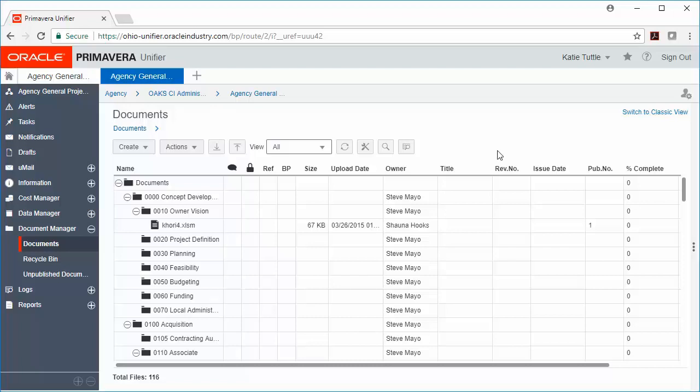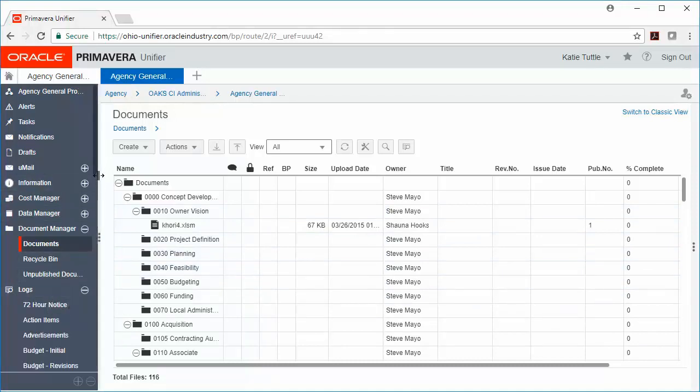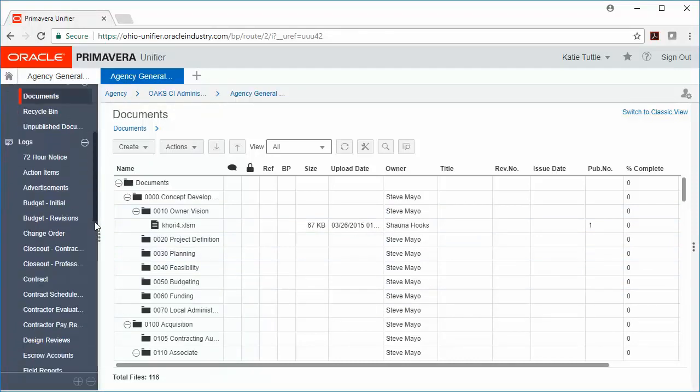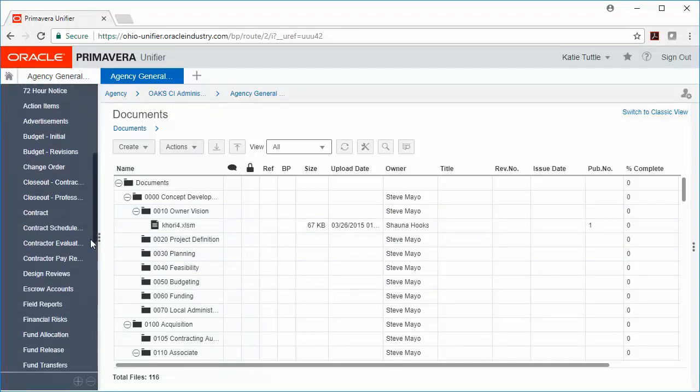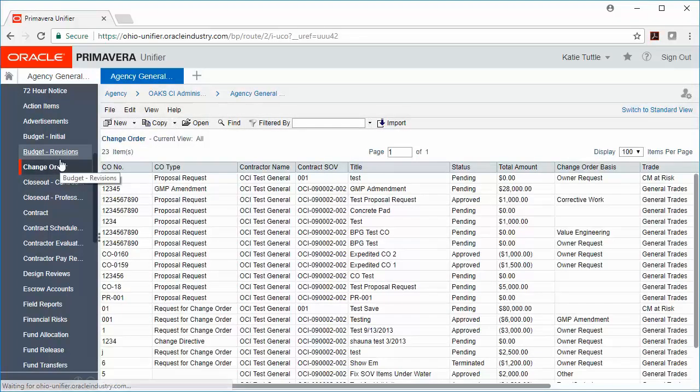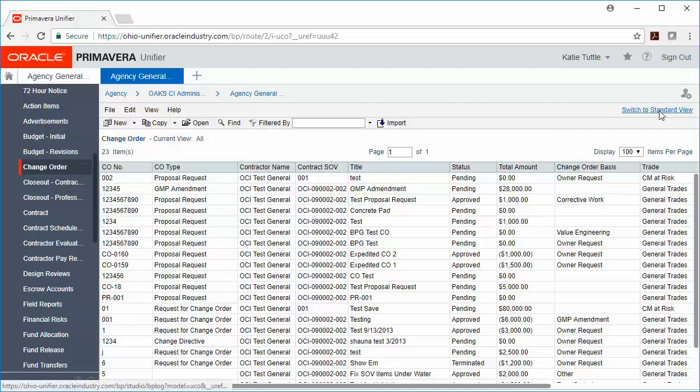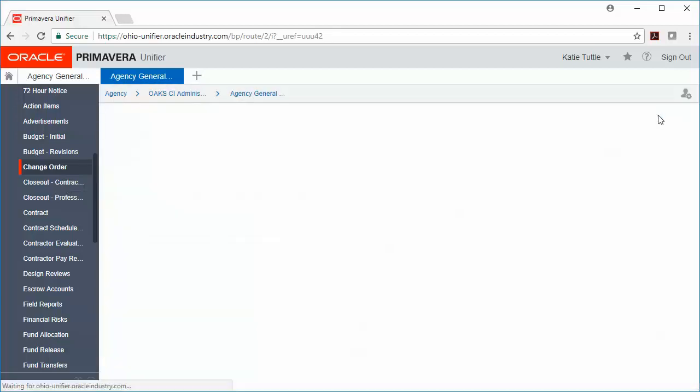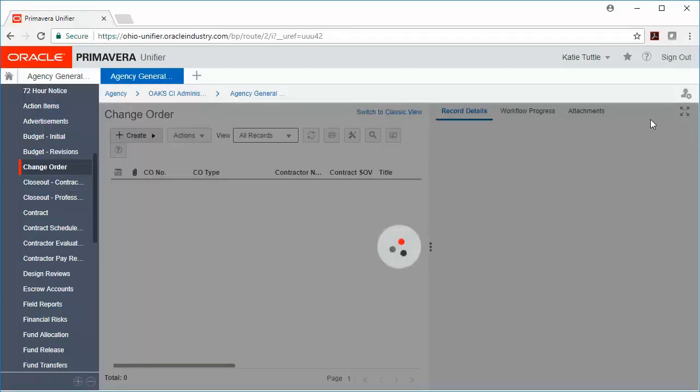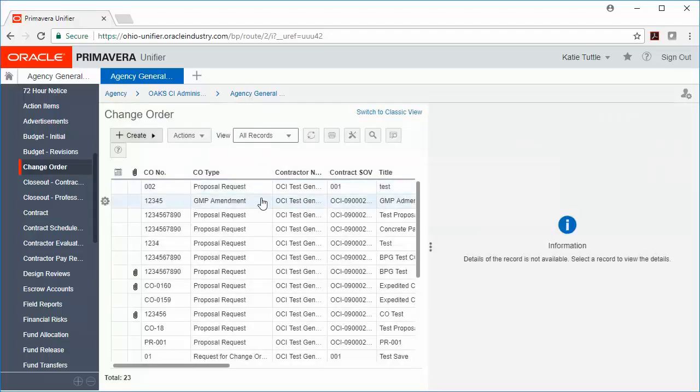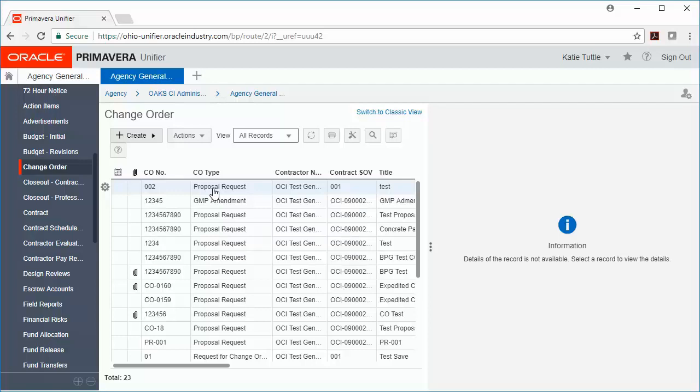Now let's move down to Logs, and then let's click on a record. For example, let's click on Change Order. In Logs, we're going to switch to Standard View on the right-hand side of your screen. And then we can see an entire list of the change orders. So when we talk about logs, logs houses actually all of the records for your project. So that's your contract, your professional services agreement, your change orders, your amendments, RFIs, design reviews. All of those records that are important to your construction project are going to be housed in logs.